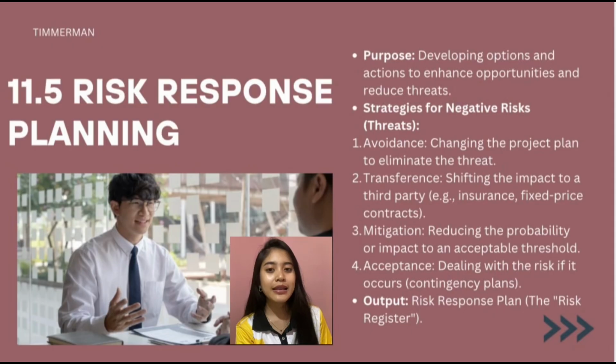So lastly is acceptance. And then acknowledging the risk and preparing to deal with it if it happens. Instead of preventing it, the team creates contingency plans to respond quickly if the risk occurs.